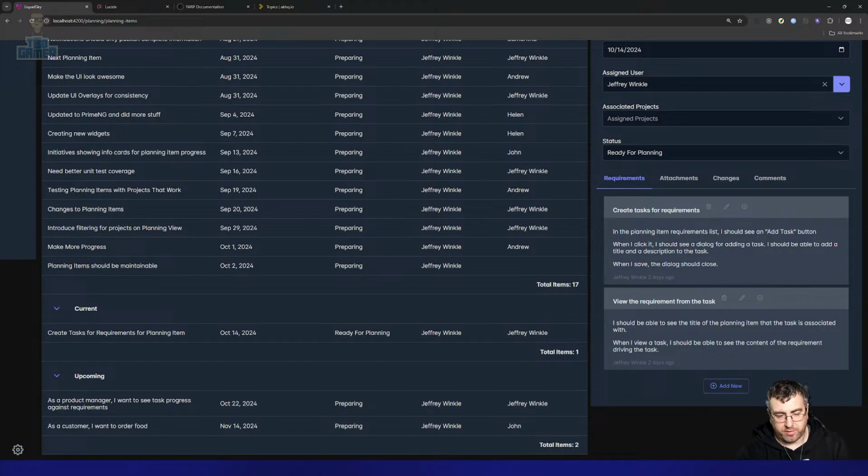You might get project 1 done within 2 weeks in the serial manner, but it might take 8 weeks in the parallel manner. But then you've got all four projects finishing in one time frame. Yeah.